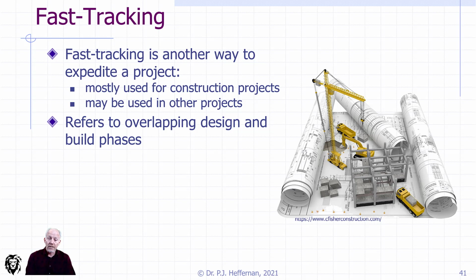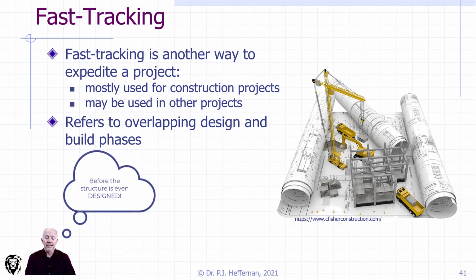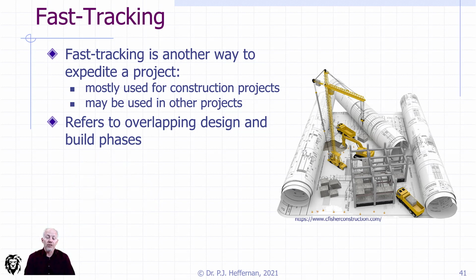So even technical design decisions on the early start, where you're building foundations before the structure is built, as an example, you're making assumptions as to how heavy the structure is going to be, and perhaps padding your decisions so it might cost you slightly more money because you're giving yourself some latitude for decisions not yet made. But if the cost savings associated with the accelerated time make up for that, then that all works out.